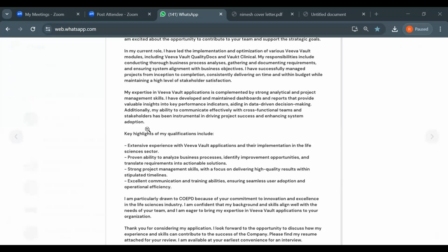We also have a tool if my availability was not there, because we have only two BAs in our team and one was me. If both of our availability was not there, we have a tool where users can put their change requirements. We take the change requirements, prioritize them, and based on that we develop and change the code that is required, and we release them based on the priority and urgency of the requirement of the system.